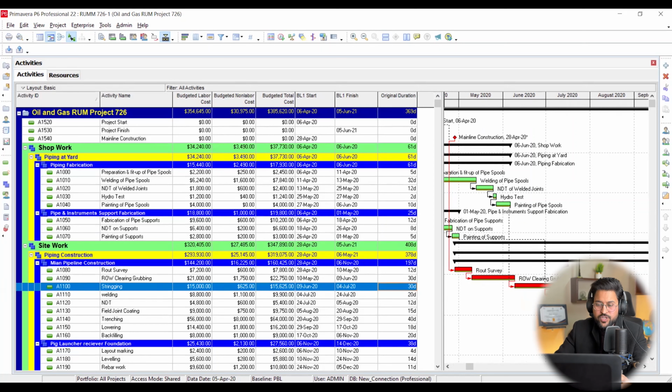You are not supposed to change anything without consent. Anything you want to change in terms of time, cost, scope, you need to take change management approval. You have to go through that process, right? So that is the importance of your assignment of baseline.